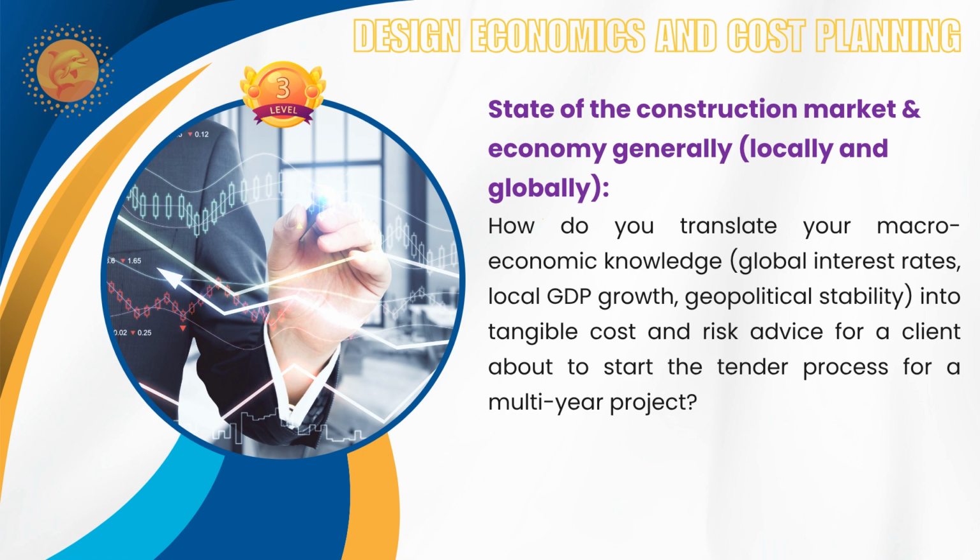And contingency: increase the construction risk contingency to account for potential labor and material supply chain issues, because this is again the specialist subcontractor suppliers. When there is high demand, it will be very difficult to get a competitive price.